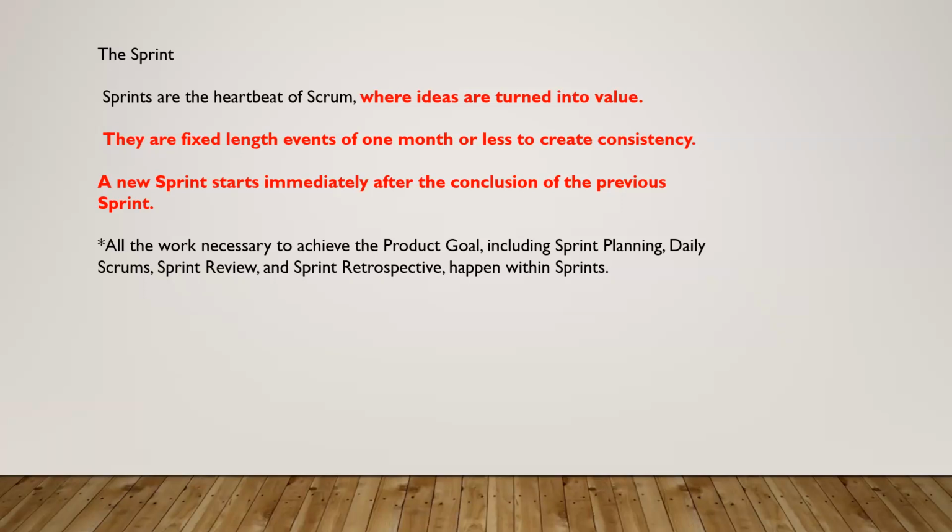Or if you have this empiricism, which we discussed yesterday, where you use the knowledge gained from experience to estimate, then you can compare. You can say, I have worked on this particular task previously, so I can give this number of hours or days.